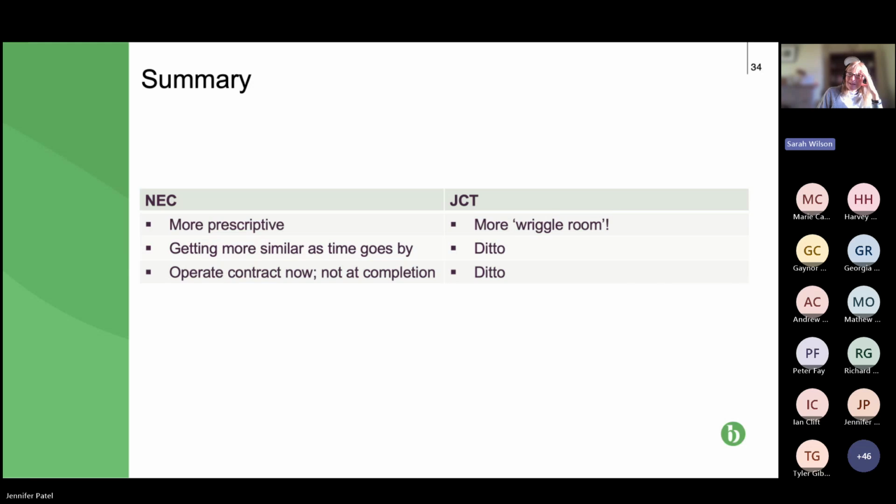It's a good discipline to get into, and also once you've identified it, it means that you are aware of it, and you can ensure that timesheets are completed properly, so that you can claim the full amount that you're entitled to, rather than losing out because timesheets and documents aren't in proper order to prove how much time and cost issues resulted in.